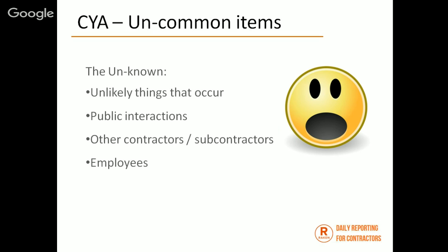So I said to the attorney, I want to know some more information about what you're talking about. Can you tell me the date and what it is we did that affected his business, just send that over to me. Certainly if we injured his business in any way, we would take care of that. I played it off like, oh, that's what we have insurance for. So he sends me an email with the information of what they were looking for. And I just responded quickly with the pictures and the video. I said, please take a look at this before proceeding any further. So there we were. We never heard from him again, obviously. So, it's little things like that we don't know are going to happen that we need to record for.